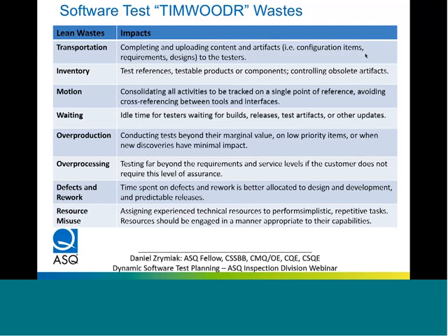So then, as I say, new discoveries have minimal impact, but if they're still consuming time and tester activity, that's a point where you have to cut it off and shift the work to areas that have not yet been tested.